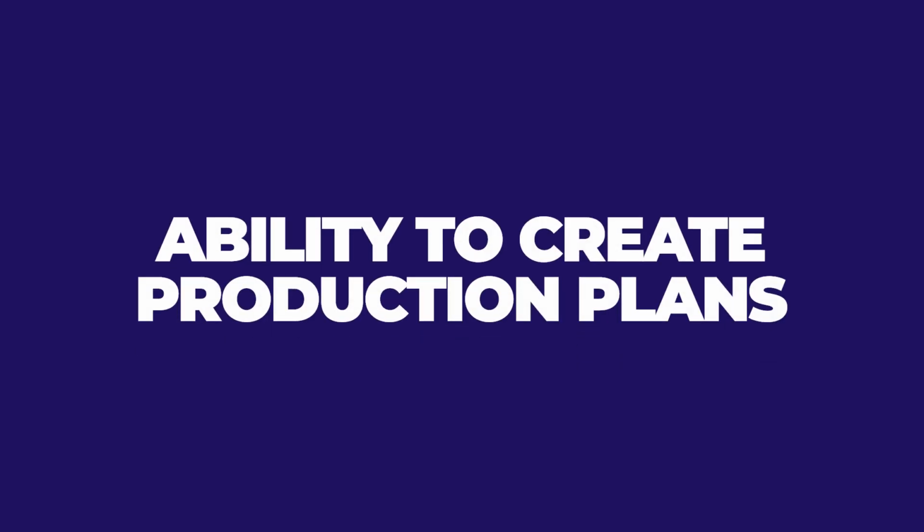The second thing that you need to evaluate is their ability to create production plans and do production planning in general. And I'll just go ahead and call it scheduling to help everyone out. On a construction project and in the construction industry, we have some very key considerations. We have cost, we have quality, we have schedule, and we have production, and there's other things that you can loop into that. But the bottom line is your production plan, your schedule precedes everything else, meaning your production plan enables your financial health. Your production plan enables your quality work. Your production plan enables safety. It enables all of these other things. So it definitely comes first.